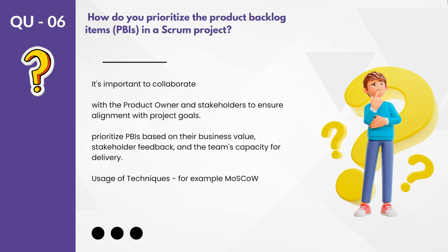But in the same sprint cycle, suppose there are 4 or 5 days of leave for one of the team members. So instead of 25, you can only deliver 20 story points because of the leave plan. Now 5 story points are fewer. So which stories will you move to the next sprint? Again, prioritization will come.